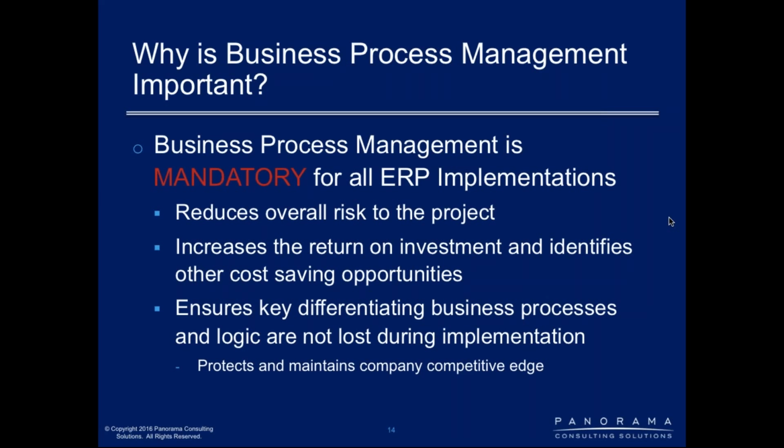If you want your project to succeed, you really do need business process management as an important work stream and component of your overall ERP initiative and business transformation initiative. In particular, it reduces risk to the project because it ensures that the processes are driving the software rather than the other way around. It's not on the slide, but one thing that comes to mind is that you're also making sure that you're not having expensive technical consultants on the meter with the clock running, making decisions around how you should be running your business. Those decisions have already been made, and the technical consultants have a clear roadmap or blueprint for how they need to configure or customize the software to fit those needs.